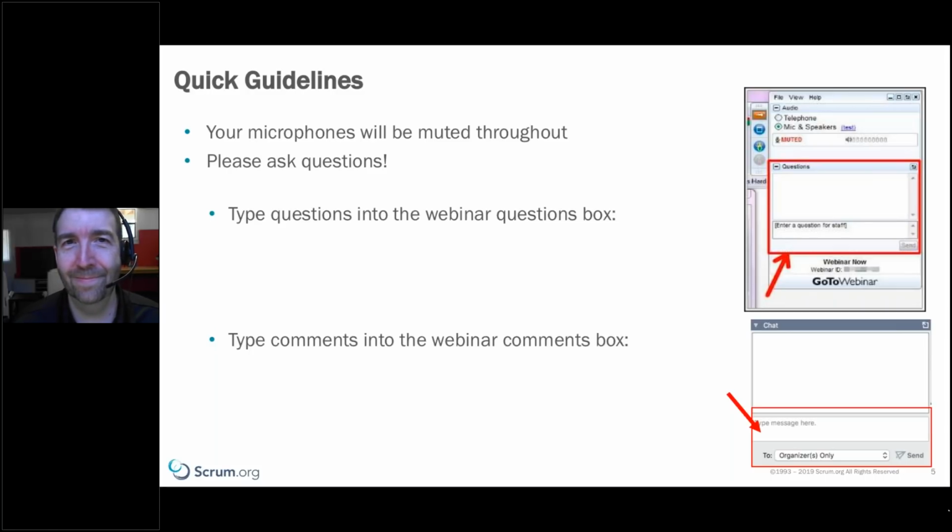Yeah, I think it is. And one other thing to note there, and you just touched on it, Russell, is, what are stakeholders looking for? Because remember, we can deliver thousands of times during a sprint. We don't have to deliver once per sprint. So if they're looking for more frequent delivery, we can still do that within a 4-week sprint. We're just doing our planning and our reviews on a monthly or 4-week basis, but we can be delivering iteratively as we go throughout the sprint.